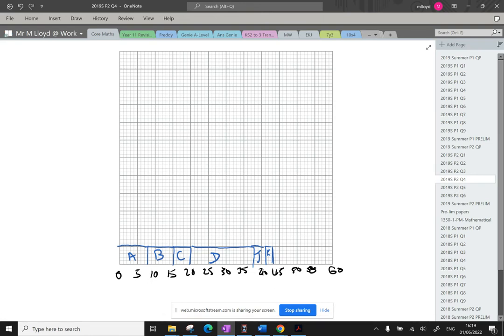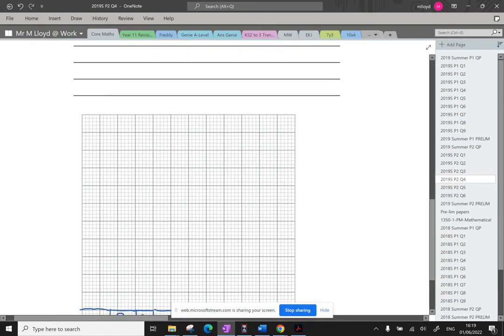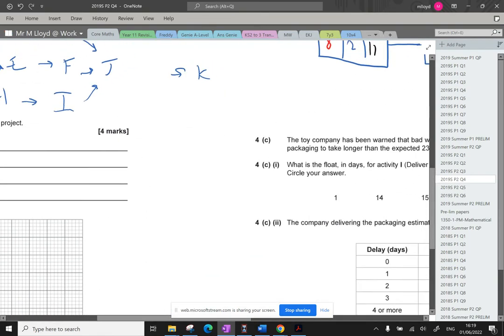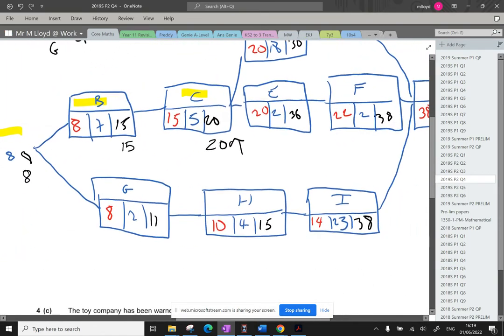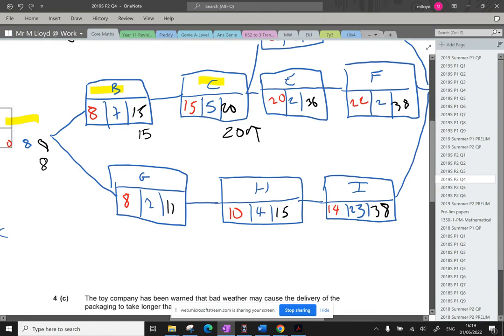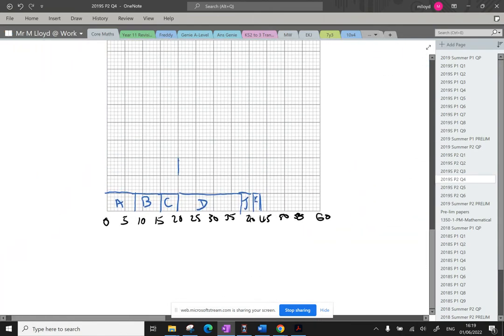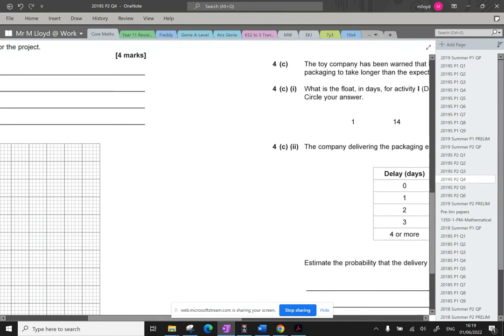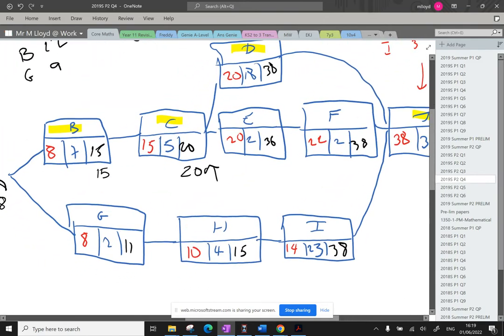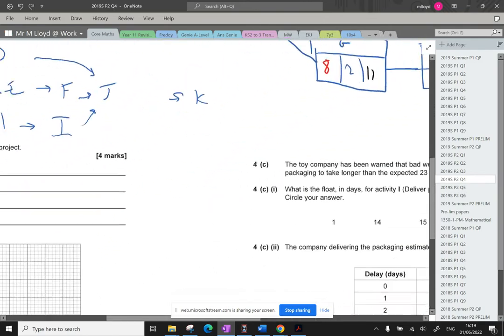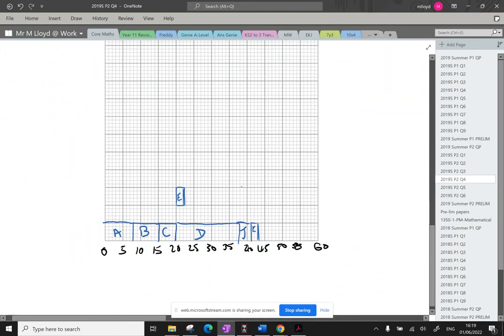So E is my next letter. I'm going to hover that above. E, where was it? Has an early time of 20. Duration of two. Early time of 20. A duration of two. That's E. And then it has quite a big float time. So the late time for that is at 36. So I'm going to put in here. And I'm going to make it a nice dotted line. Sorry about that, Surface Pro. That's my excuse. So that's E.